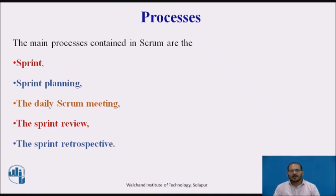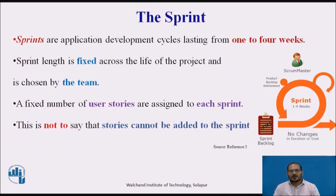The main processes contained in Scrum are the sprint, sprint planning, the daily Scrum meeting, the sprint review, and the sprint retrospective. Sprints are the application development cycle lasting from one to four weeks. Sprint length is fixed across the life of the project and is chosen by the team. A fixed number of user stories are assigned to each sprint, though stories can be added as long as doing so does not exceed the team's capacity to create, test, and deploy a working application by the end of the sprint.